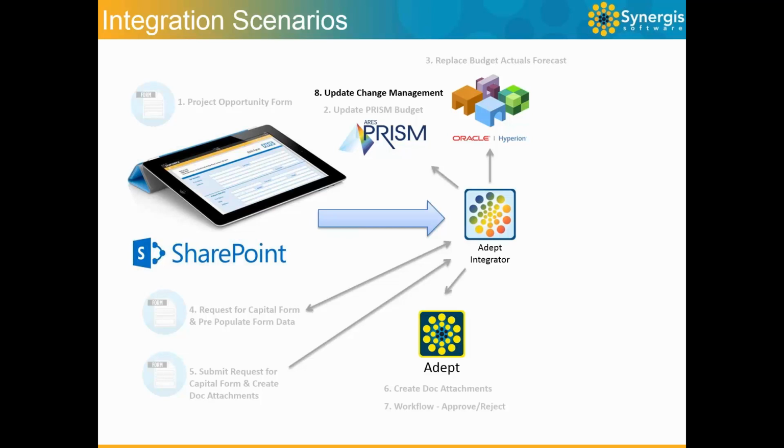What will happen from there is that an approve or a reject will happen. Once we've gone through certain panel reviews and the project's approved, in our example, let's just assume a positive example, it now updates the cost management system where a change management event will happen.